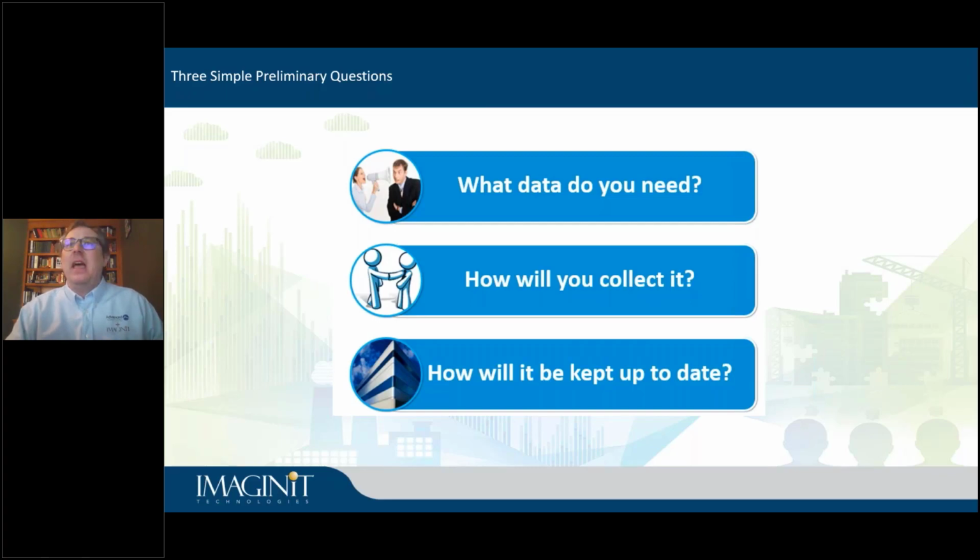The next piece is, once you have that defined, how are you going to get it? You heard Matt talk about delivery standards on their projects from the AE partners. You define well-developed architectural and construction delivery standards that detail what you're expecting to receive at handover. There are a number of different ways beyond capital projects that you can collect this data. There's laser scanning, existing condition capture technologies, where you can go out, scan a facility, and convert that to a model.